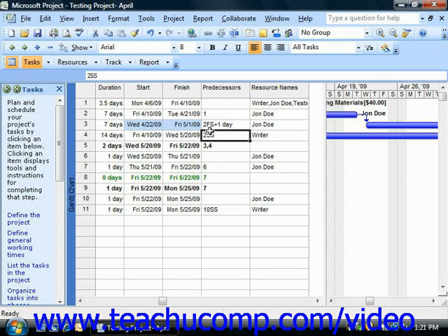constraint. You can also create semi-flexible constraints which allow for task scheduling within a date boundary that you choose. So for example, setting a start no earlier than constraint will allow you to schedule your task anytime after a specified date has passed. So that's an example of using a semi-flexible constraint.